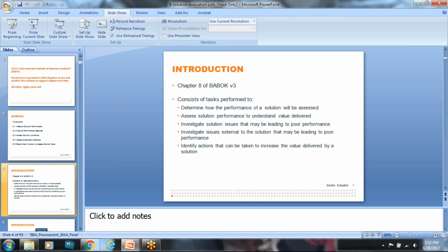So even though we can't do a true agile implementation, we try to use elements of it, and we feed that back to the vendor and prioritize. We say, okay, we're doing our evaluation, here's what we've come up with, can you do this? Is it a quick hit? Great, we can do that. Is it something that we can't do? If it's something we can't do and it's not that important, we'll defer it.